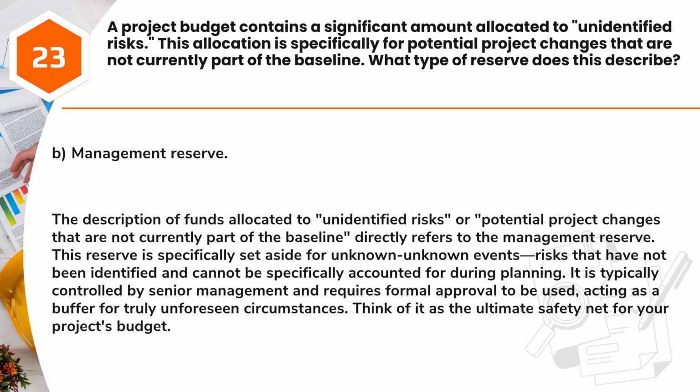Answer: B. Management reserve. The description of funds allocated to unidentified risks or potential project changes that are not currently part of the baseline directly refers to the management reserve. This reserve is specifically set aside for unknown events, risks that have not been identified and cannot be specifically accounted for during planning. It is typically controlled by senior management and requires formal approval to be used, acting as a buffer for truly unforeseen circumstances. Think of it as the ultimate safety net for your project's budget.